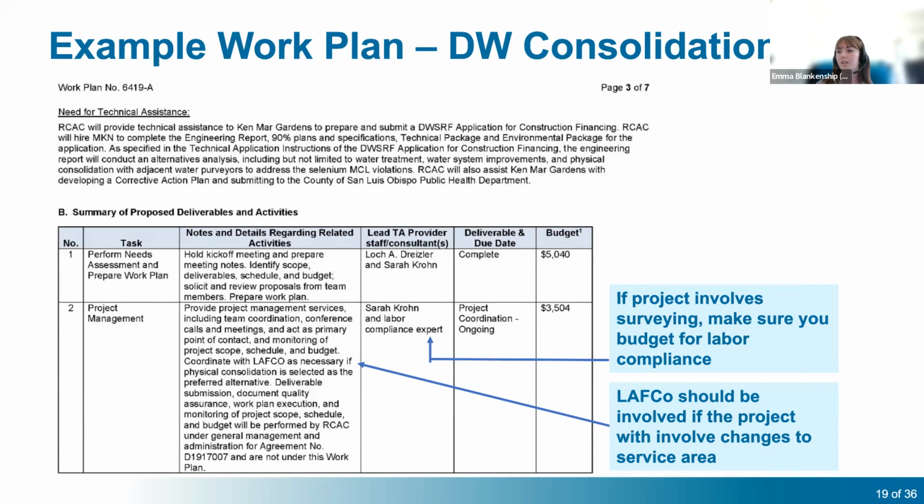And then for the tasks in this deliverables table, just a couple of things to note with these first two tasks. If your project's going to involve surveying or some other type of protected job classification, then you should make sure that you budget for labor compliance in the work plan. Also, if the project's going to involve any changes in service area boundaries or like a consolidation project, it's also helpful to include LAFCO in the project and in the work plan as well.